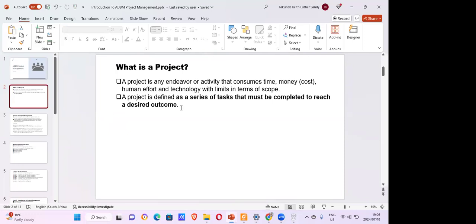What I'm going to do here is look at the characteristics that make something a project and the characteristics that do not. A lot of things that happen outside, people call them projects, but a lot of them are not projects. If you go to your workplace and do your tasks on a daily basis, maybe receiving calls, writing reports, you can't call them projects. Why? Because they are repetitive tasks that you are always doing on a daily basis.